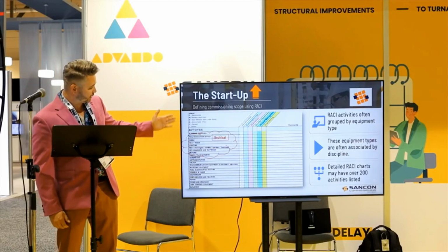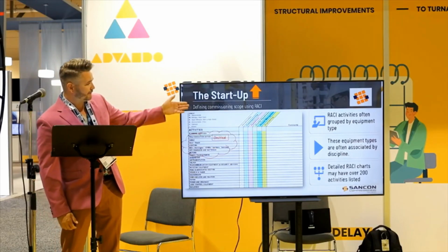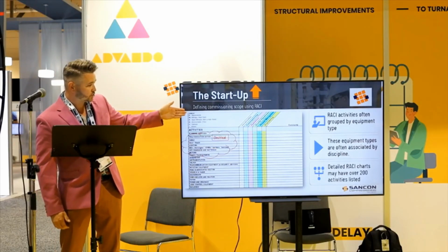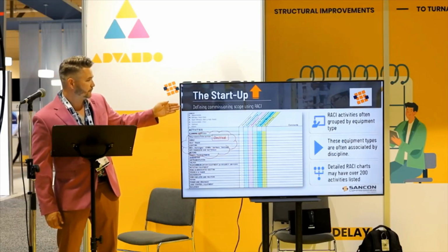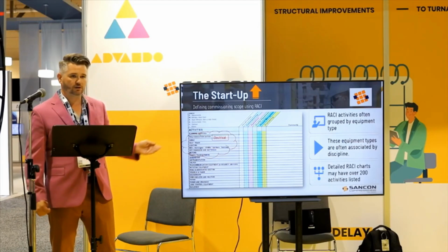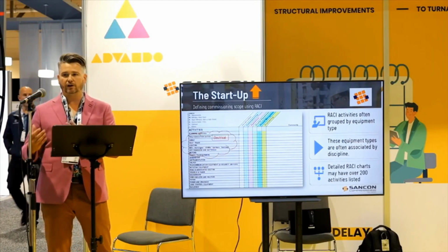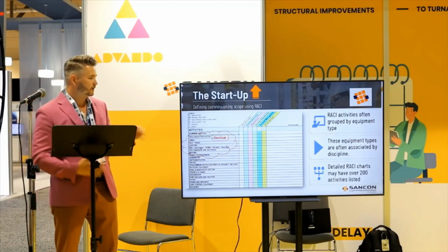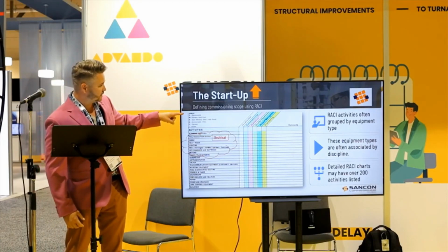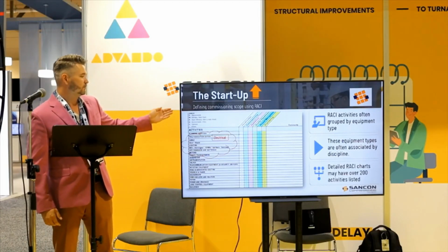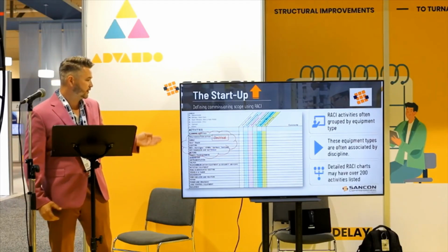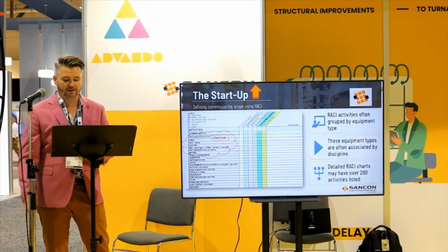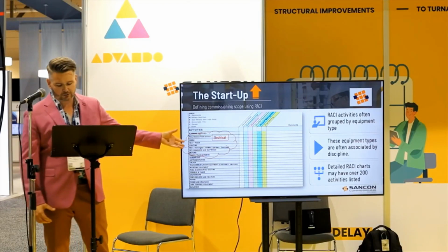So we have our electrical scopes of work here. We have our different departments. We have our construction contractors, our commissioning contractors, our operational teams, any project management and engineering. So whether it's oversight, governance, execution, we want to define the specific roles that are going to be completing. So who's responsible? What might be a witness point for operations to see? Who's accountable? Who's going to consult and inform on these different specific tasks within the RACI?